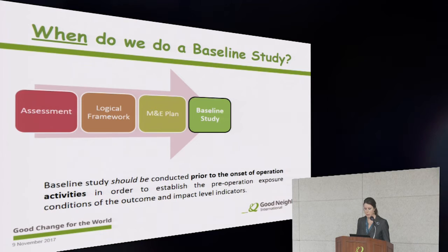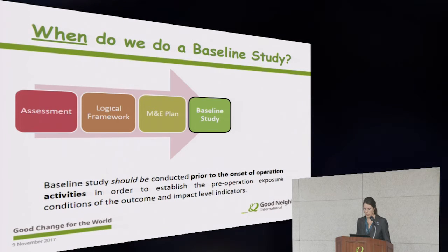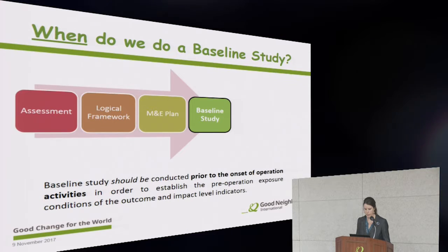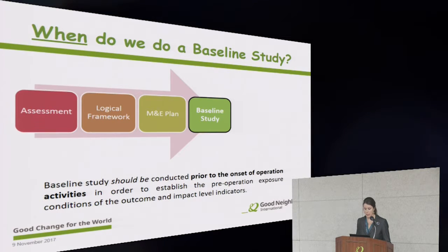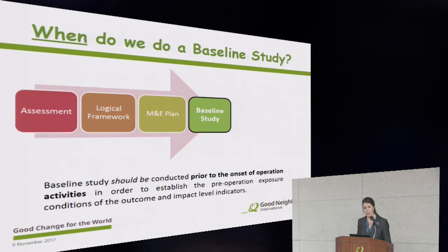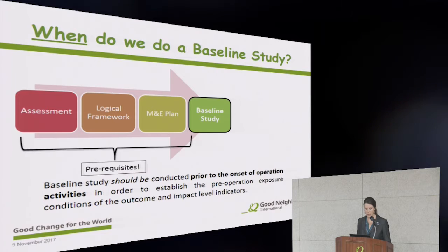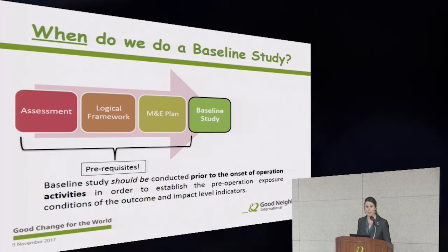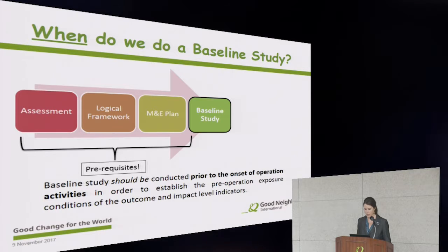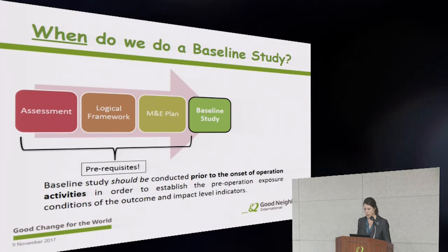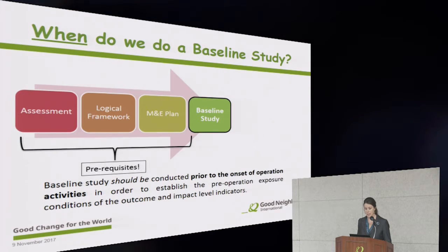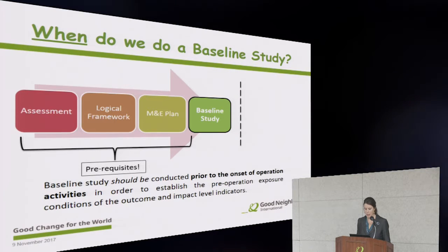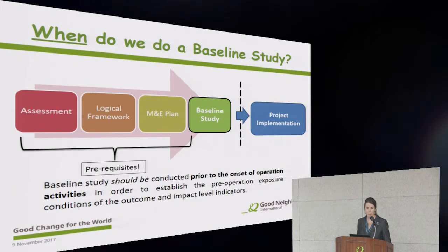Like each step that we discussed before, the timing of the baseline study is very important. As we already discussed, and I hope you see the reason for now, the assessment, the log frame, and the M&E plan are prerequisites for the baseline study. So they should come before the baseline study. And then, similarly, the baseline study is a prerequisite for project implementation, and project implementation should come after the baseline study,